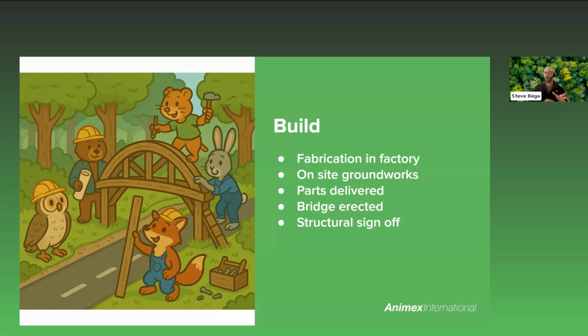Now, too often, as I mentioned earlier, arboreal crossings are left as a final sign-off item, and this results in delays and unnecessary expenses for the potential client, or obviously if it's your money you're spending, it's your money. So including them early in that planning stage ensures they're built efficiently as part of a main contract or construction schedule. And fabrication and construction are typically the shortest stage in this entire process.